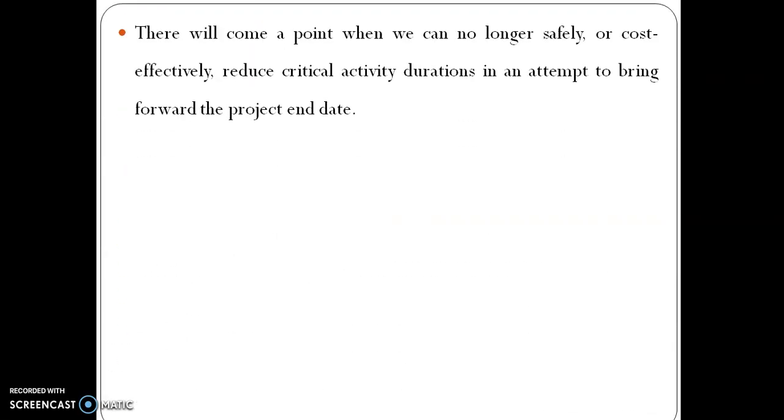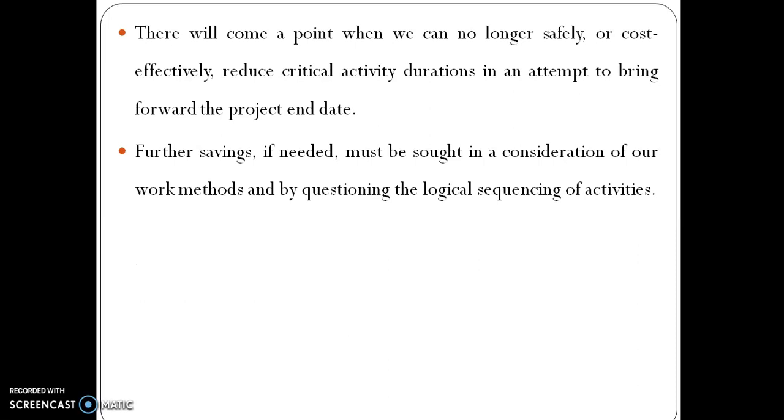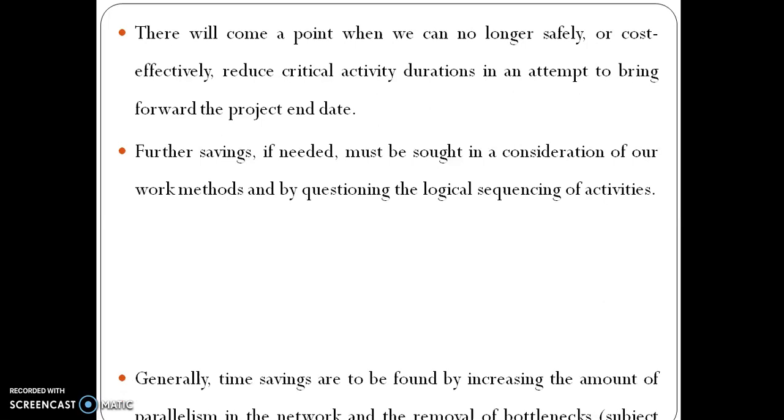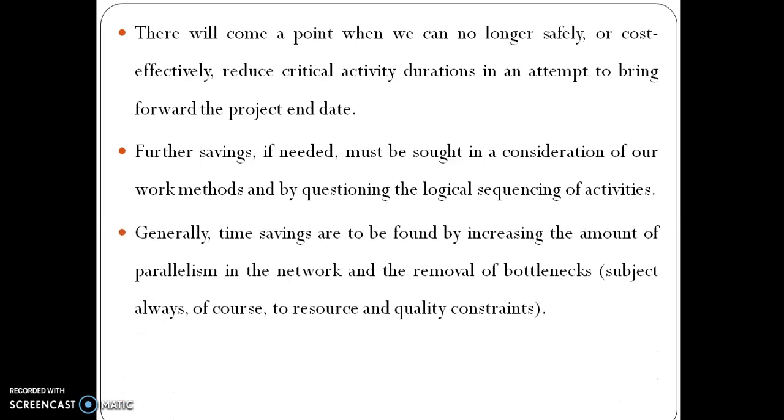There will come a point when we can no longer safely or cost effectively reduce critical activity durations in an attempt to bring forward the project end date. Further savings, if needed, must be sought in a consideration of our work methods and by pursuing the logical sequencing of activities. Generally, time savings are to be found by increasing the amount of parallelism in the network and the removal of bottlenecks.